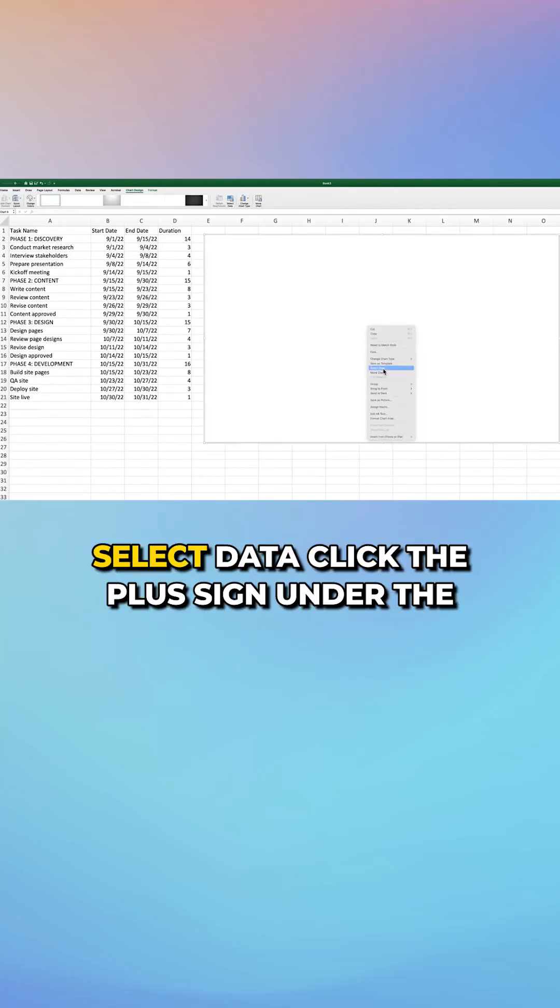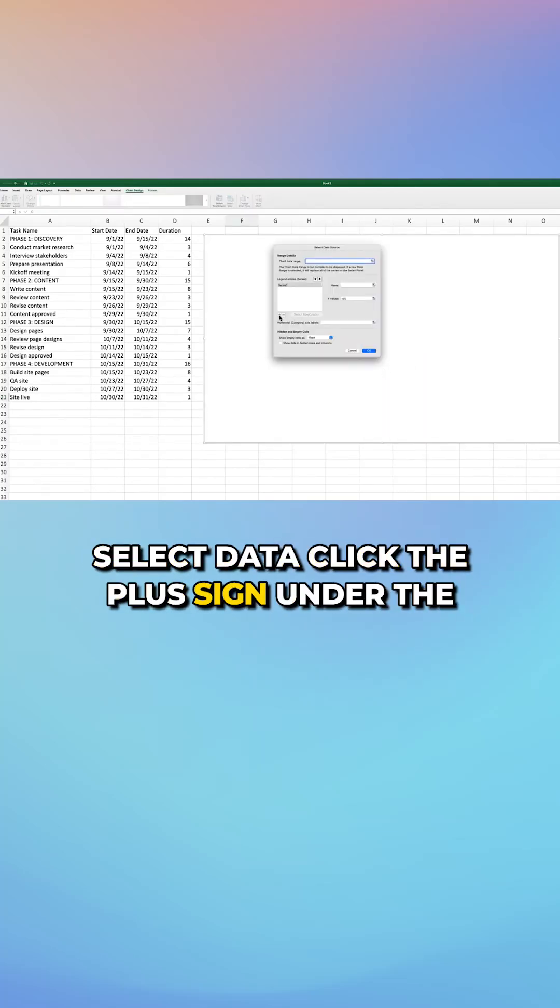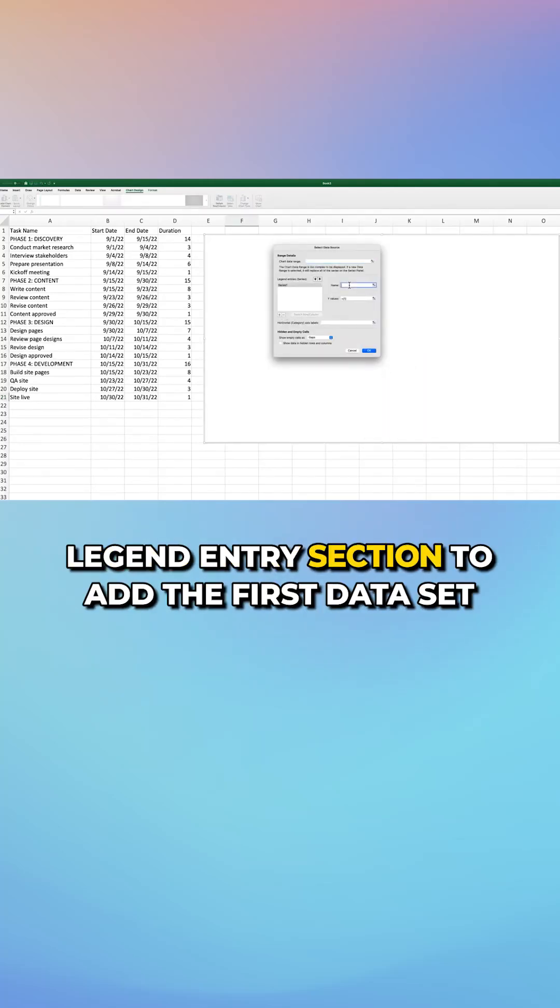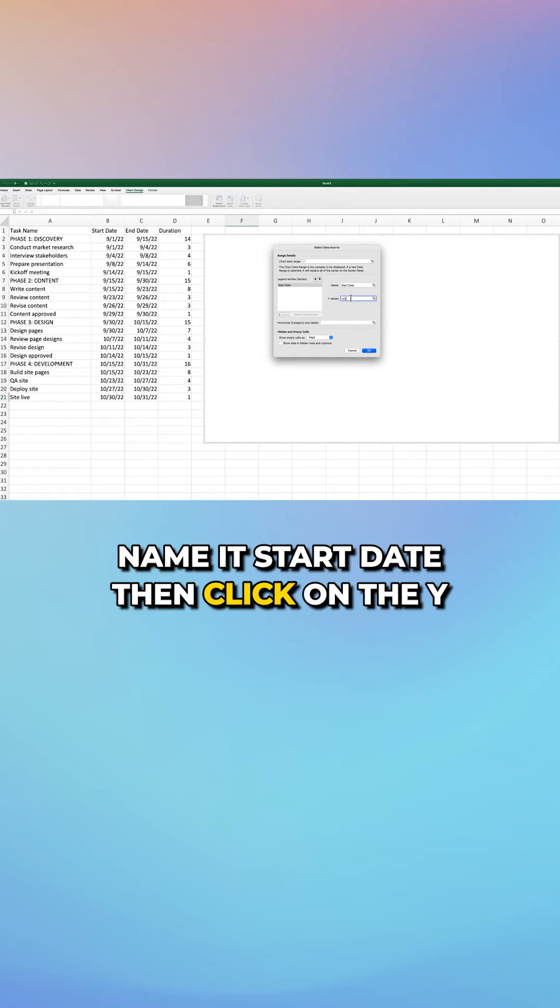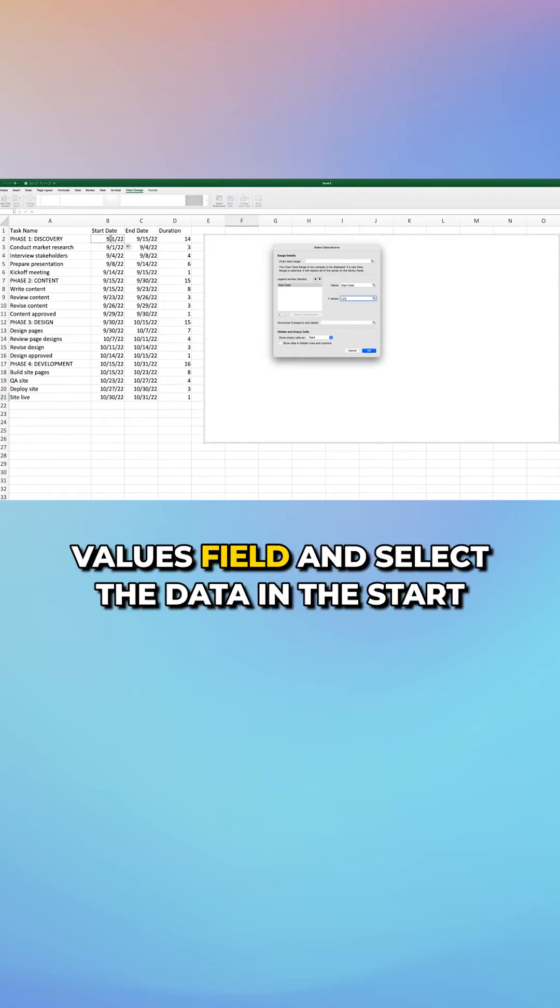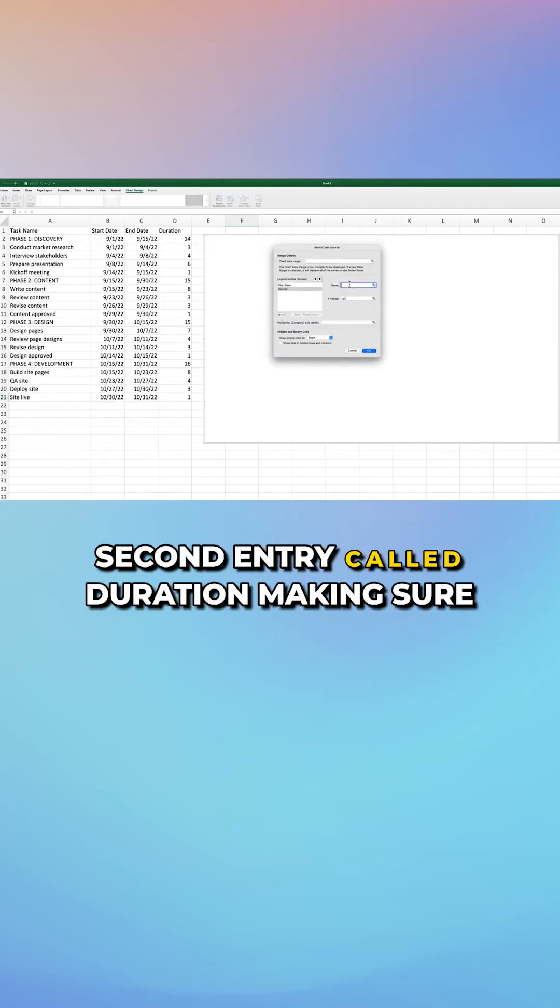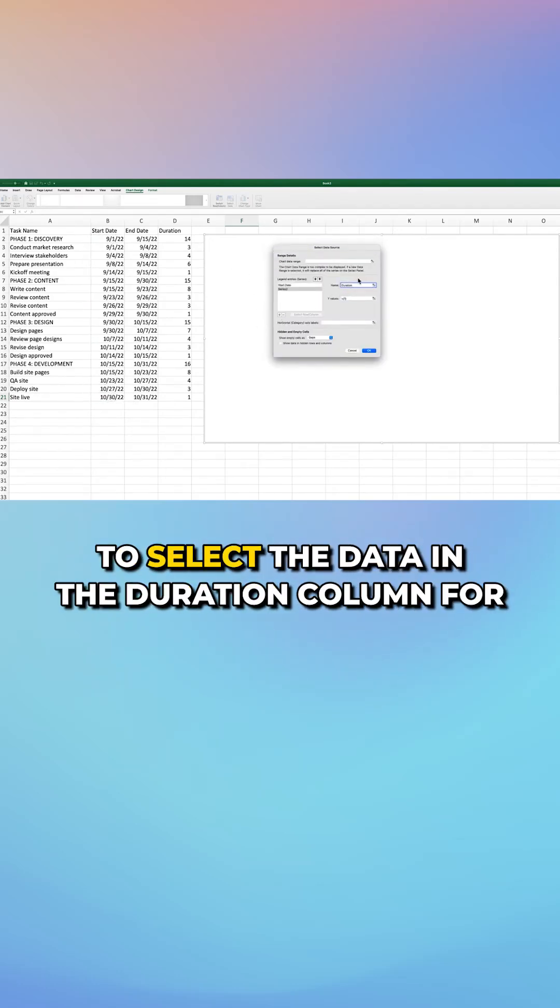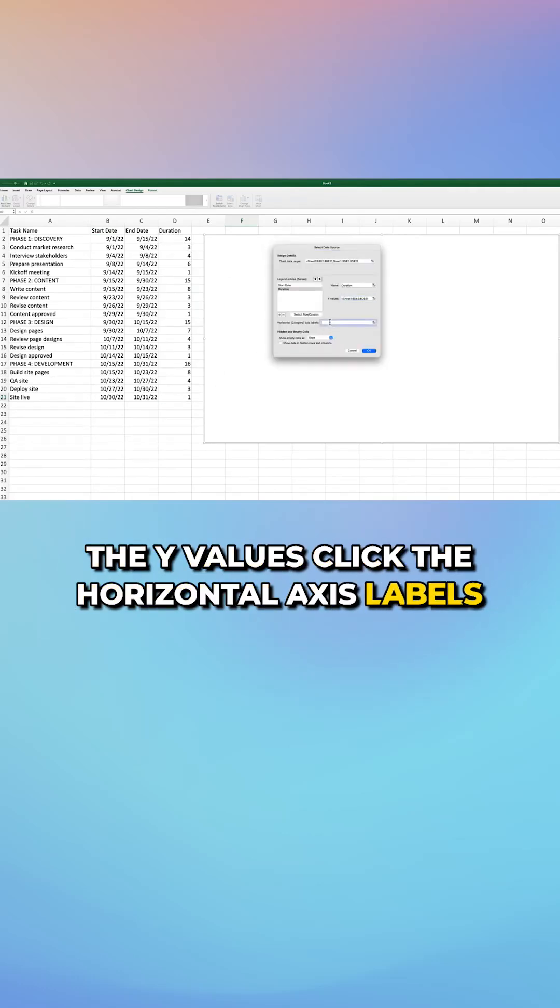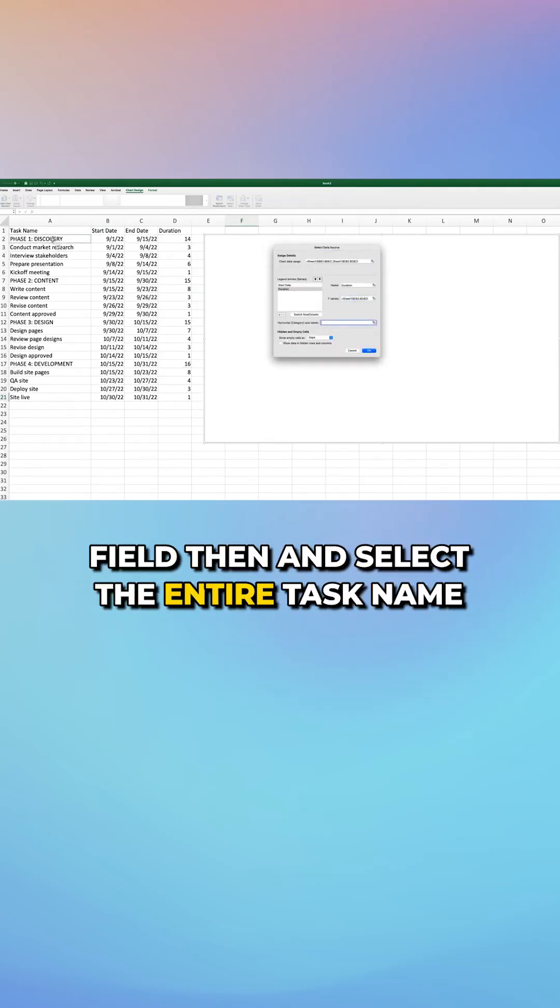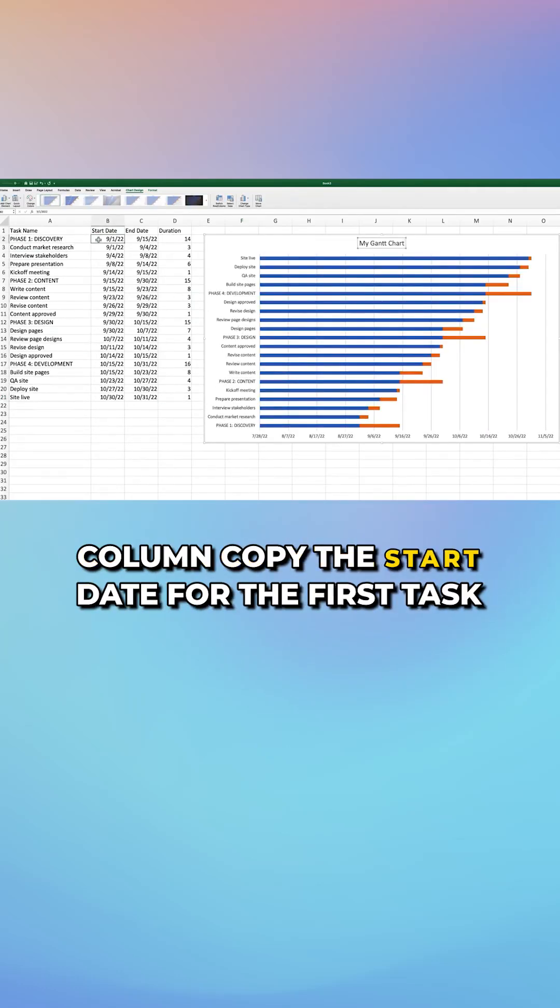Right click the chart and choose select data. Click the plus sign under the legend entry section to add the first data set. Name it start date, then click on the Y values field and select the data in the start date column. Repeat this process to add a second entry called duration, making sure to select the data in the duration column for the Y values. Click the horizontal axis labels field and select the entire task name column.